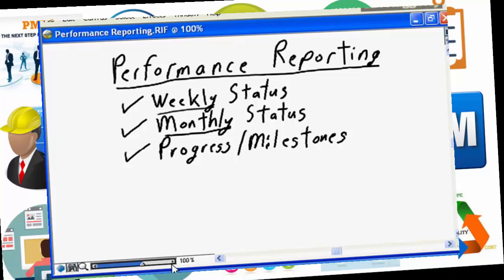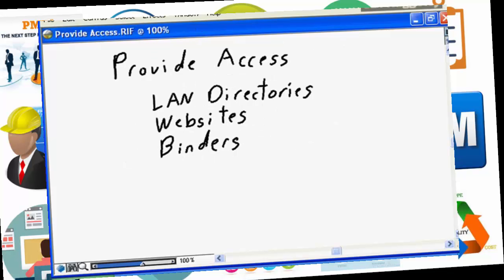So it is an interim, high-level, virtual milestone status report that says here are the key milestones, 5, 6, or 7 for your project, and here's how we're doing, so that other stakeholders, other people who are interested in the project can have a high-level view of how well the project is doing, and more importantly, have that high-level view of when the project will be completed for the organization.